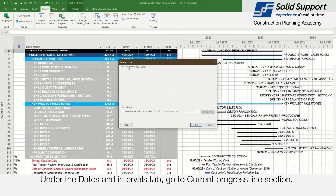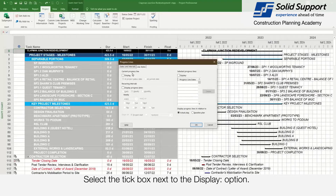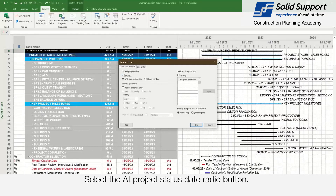Under the Dates and Intervals tab, go to the Current Progress Line section. Select the text box next to the display option. Select the Add Progress Status Date radio button.